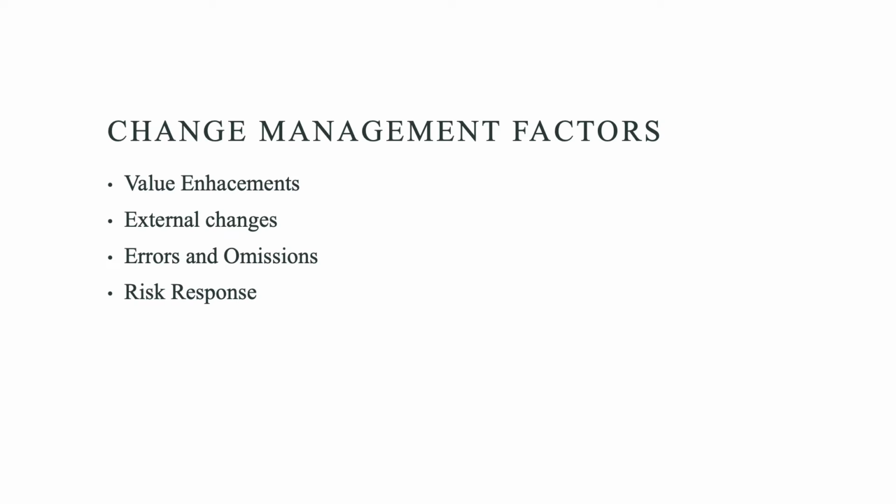Value enhancements means changes that will increase the value proposition of the project. External changes. These changes are caused by the environment in which a project operates, such as new laws and regulations put into place. Errors and omissions. This type of change results from forgotten or unrealized features or work during project planning. But it's okay. We are human, right? Risk response. Changes that are identified as a result of necessary risk mitigation or elimination responses.